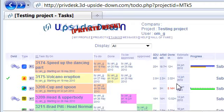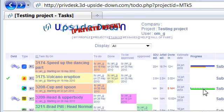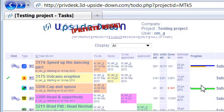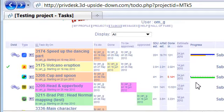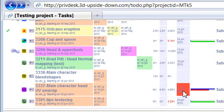So here we added a new task which has a green progress bar. The green progress bar means you are on track and on schedule and you will be able to meet your deadline if you continue working at the same pace. If it shows orange then you need to speed up a little bit to be able to complete your work by the deadline. And if it shows red then you need to significantly speed up to meet your task deadline.